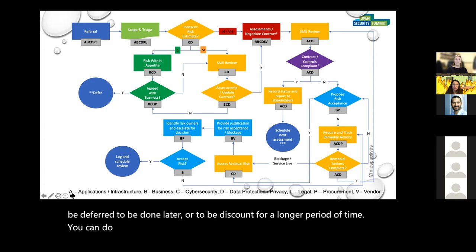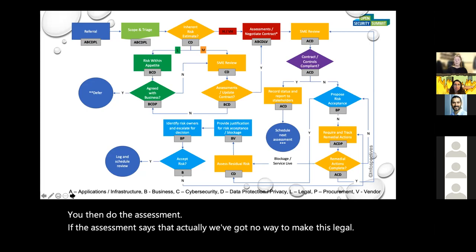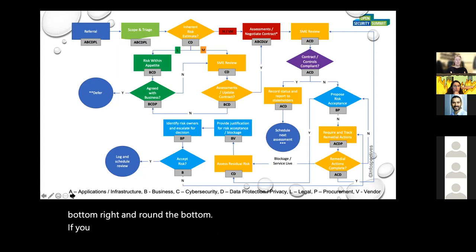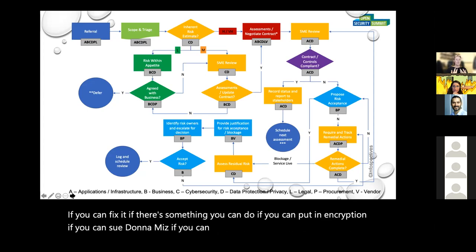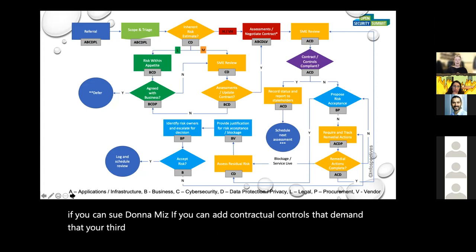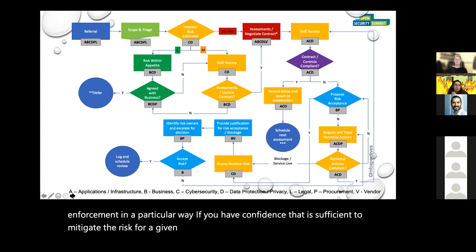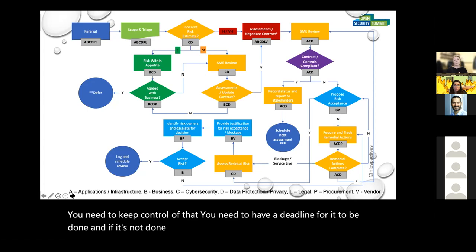You then do the assessment. If the assessment says there's no way to make this legal, you decide whether you can tolerate that risk — it goes around the risk management loop. If you can fix it — if you can put in encryption, pseudonymization, or contractual controls that demand your third party challenges if asked to submit data to law enforcement in a particular way — and you have confidence that's sufficient to mitigate the risk for a given transfer, then you need to track that, keep control of it, set a deadline. If it's not done, it gets sent around the loop again.